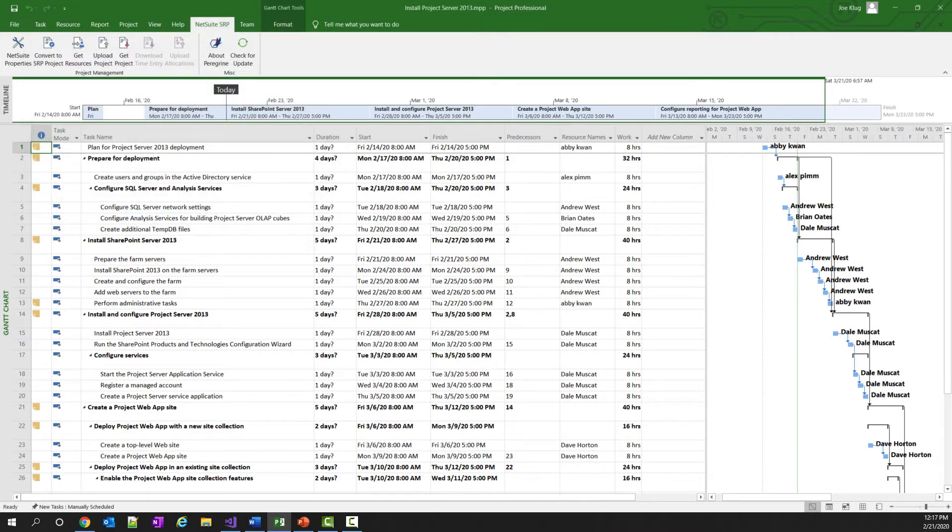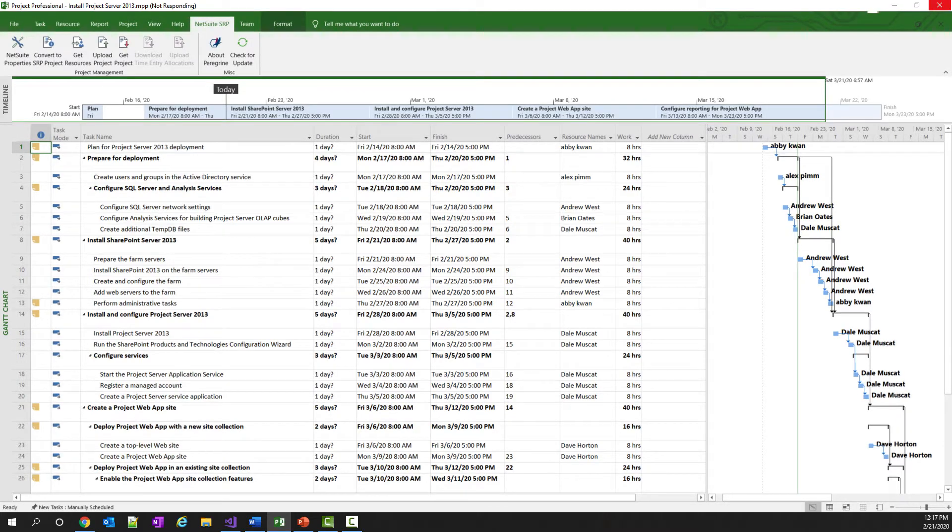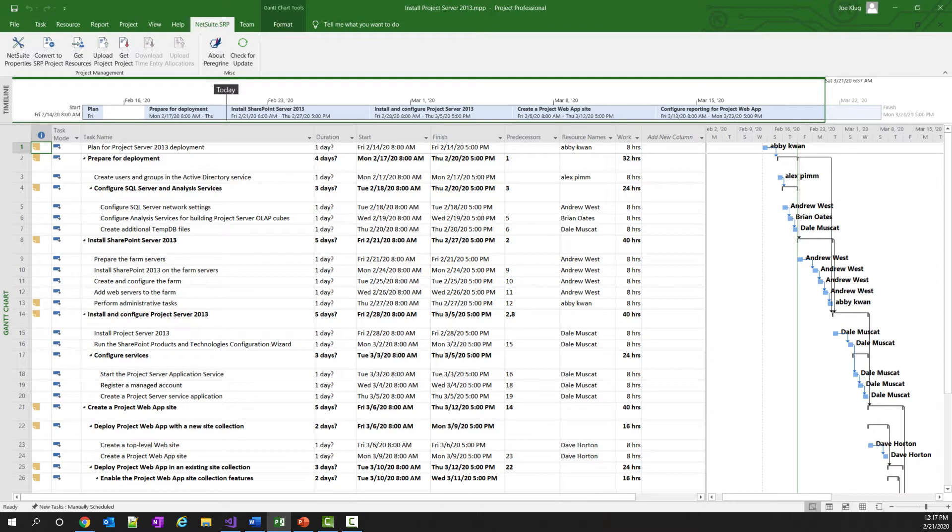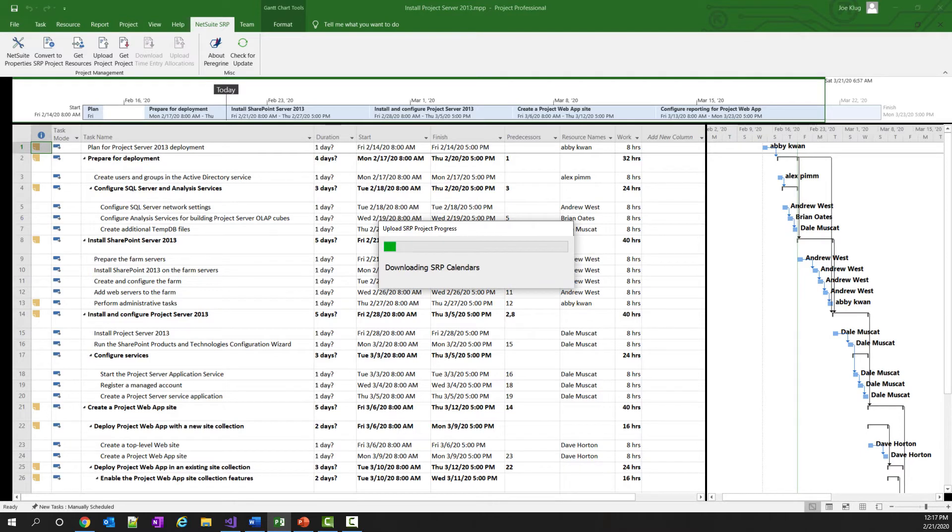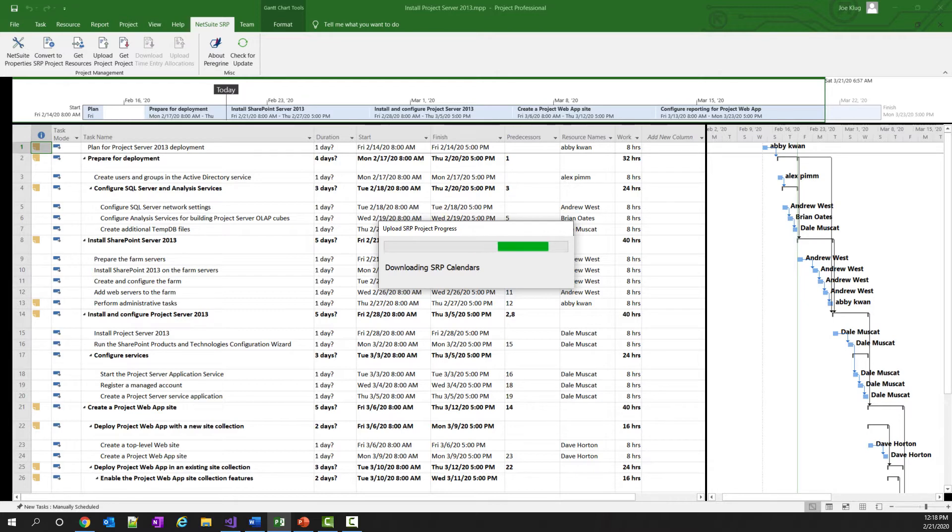Several things will happen. The first thing that will happen is the add-in will download a list of calendars from NetSuite. It does this because it wants to make sure that the default calendar used by Microsoft Project matches the default calendar that is used by NetSuite. It will also download any other calendars that are available in NetSuite just to make them available for use when you assign resources to Project Task.